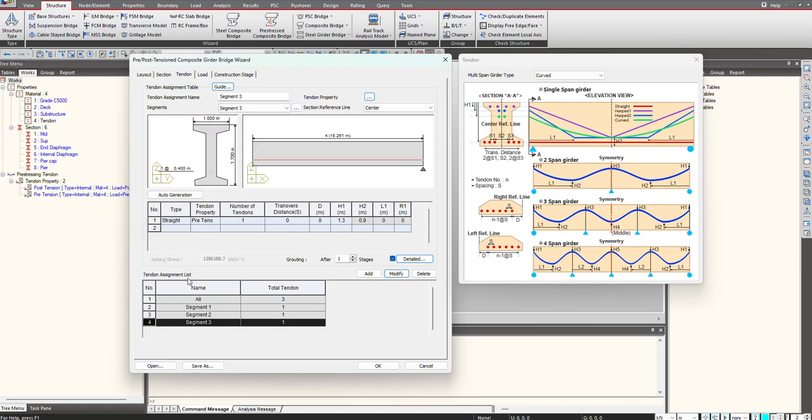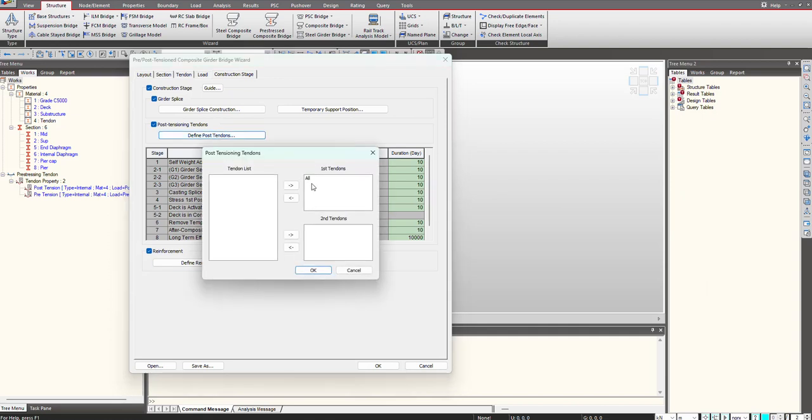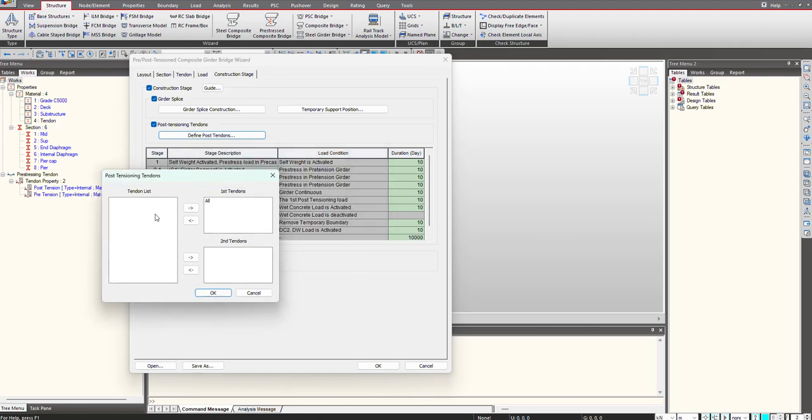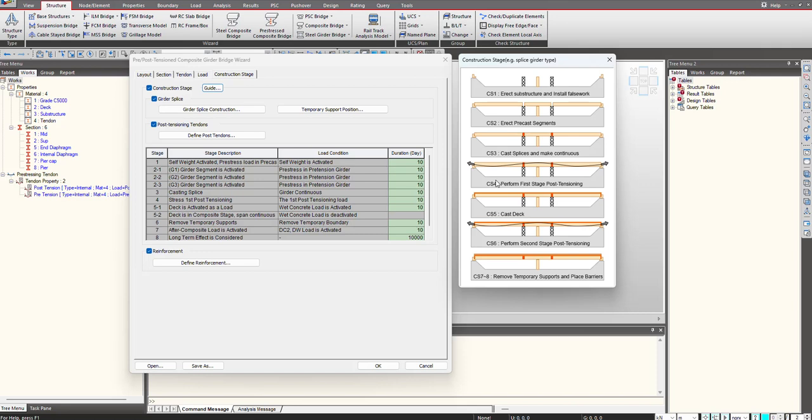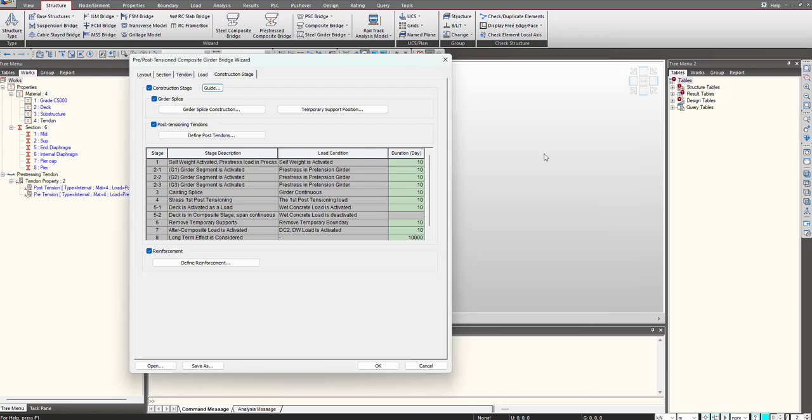Once this is done, we have defined all the tendon profile. Now when we go to the construction stage, we will be giving the different post-tension tendons. I go here and I can select what tendons are post-tensioned at which stage. Whether those are first tendons, that is they are getting post-tensioning before the casting of the deck, and in second tendons the post-tensioning will be done after the casting of the deck. This is post-tensioning 1 while this is post-tensioning 2. As of now we are doing post-tensioning 1 only for this. All the girders pre-stressing is done beforehand before the casting of the splice. You can see here G1, G2, G3 pre-stressing, pre-tension girders are done. Then the girder is made continuous by using the casting of the splice and afterward the post-tensioning is done.